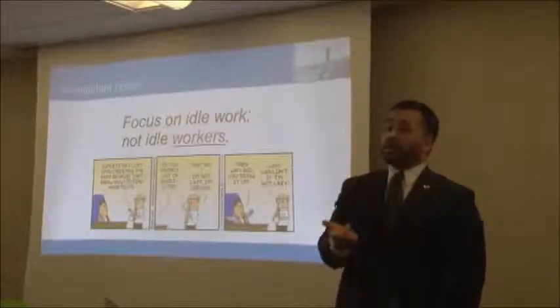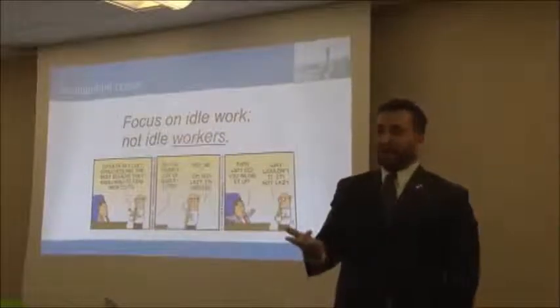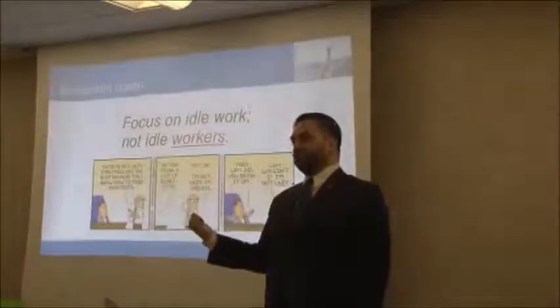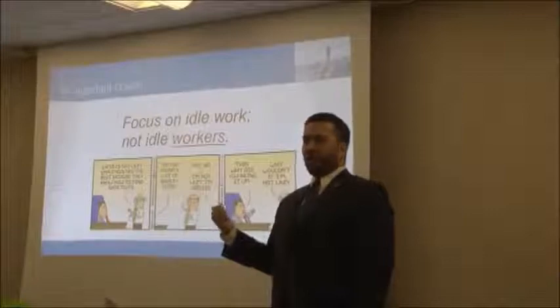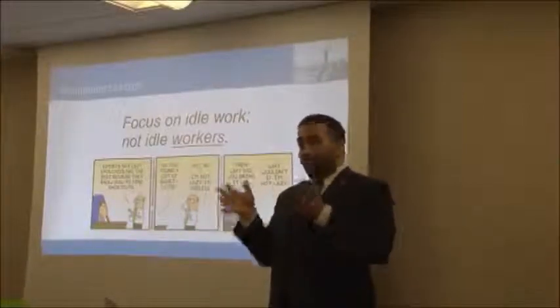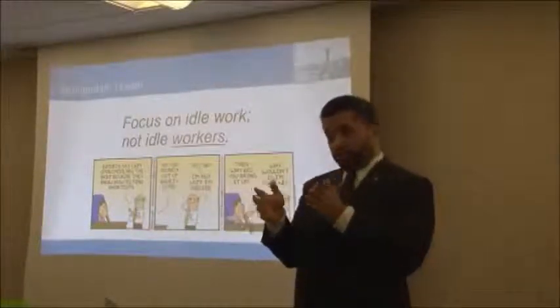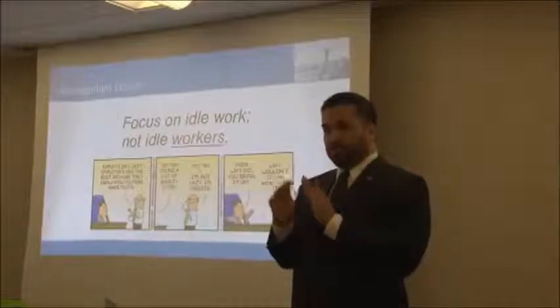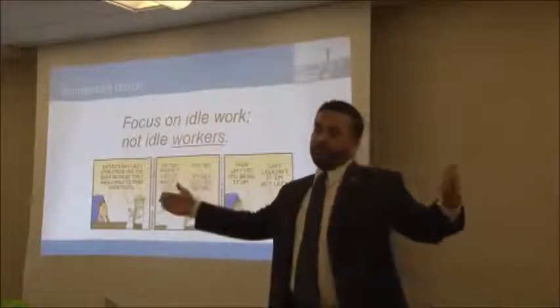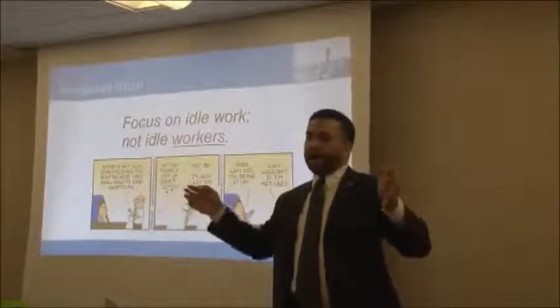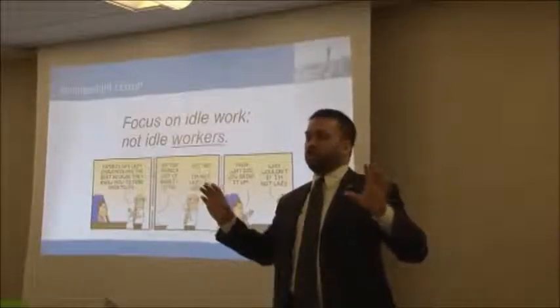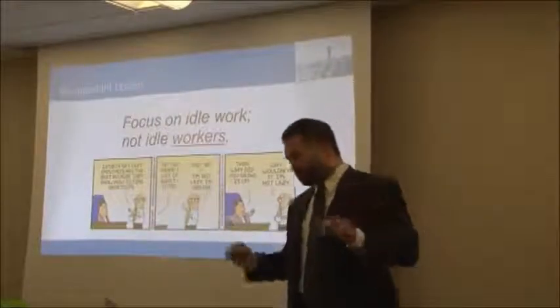And now when Bobby goes and starts working on this thing, he's now added to their queue. We talked earlier about seeing the whole. You've now optimized your engineers, which is great, I guess. You have 100% utilization, but you've made your flow slower because you've now added more work in process, bigger chunks into the flow. That's not good.